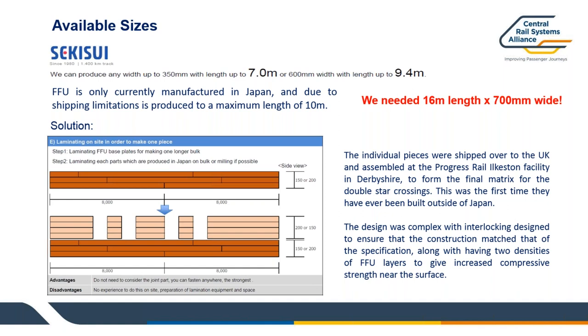So what we came across was we needed some way of manufacturing these in the UK. So we approached Progress Rail with Sekisui, who were given the contract to make the layout, and basically asked them to consider making the actual bearers, manufacturing them in one of their facilities with the assistance of Sekisui engineers. But obviously you look at Progress Rail and they probably say, oh, well, we make crossings, we make switches, we don't do bearers. So why on earth would we look at this, making it much more difficult for us to take the risk on, etc., and build these? Anyway, after a lot of conversations with Sekisui, ourselves, Progress Rail, and obviously the commercial aspects of route services supplying the layout, and commercial aspects from Progress Rail's point of view, they agreed to take the challenge